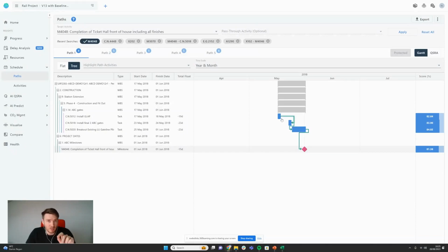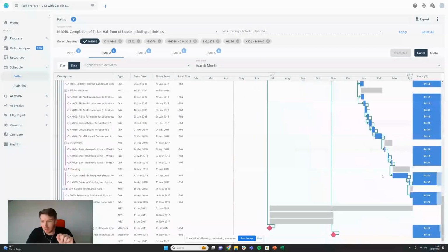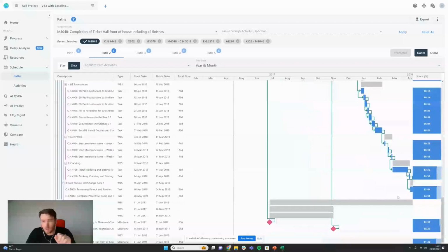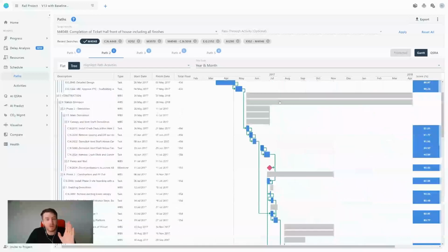If we compress this by over a day, this will become the most critical path. And this is much more complex, where we'd need to start at the end and go through how we're going to pull this entire path back here, and maybe it would require some replanning. So we actually break out the interconnections, or it would require that we work double shifts so that we increase the working time in the calendar. So we've got weekends, etc.